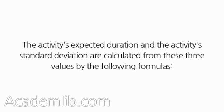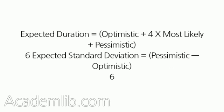The activity's expected duration and the activity's standard deviation are calculated from these three values by the following formulas. Expected duration equals optimistic plus 4 times most likely plus pessimistic, divided by 6. Expected standard deviation equals pessimistic minus optimistic, divided by 6.